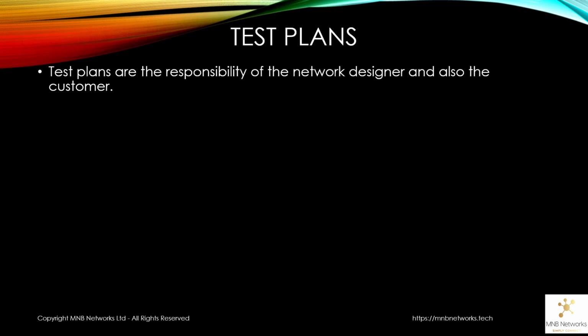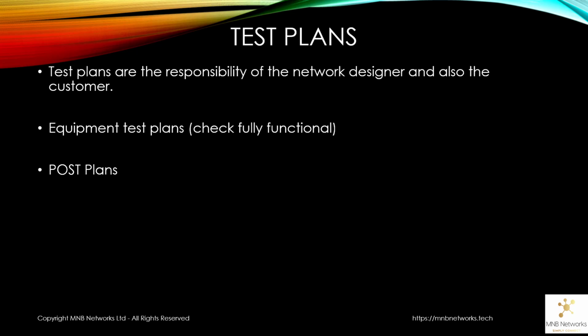So test plans. Test plans are the responsibility of both the network designer and also the customer. The reason for that is we have a few different types of test plans. The sorts of things that the network designer should ensure is done as part of the project are the equipment test plan, so make sure the equipment that arrives is fully functional. This would be when you're setting it up in the lab. So it might be the network designer, or it might be the network engineer, or the TDA.